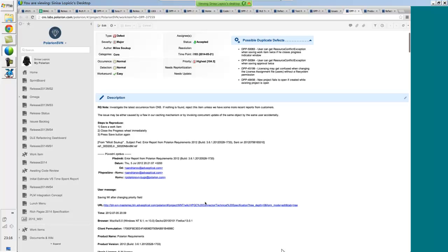We have them weekly, and it's between the manager of QA, with some key stakeholders, and what they do, they discuss specific issues. They group this backlog from the perspective of what the changing priorities are, and monitor to ensure that we're fixing the right defects in the process. And this is again one of the ways Polarion, we can very easily manage this backlog and really manage the process and what needs to be done and ensure that we actually have good justifications around the things that we do and how we actually spend our resources.